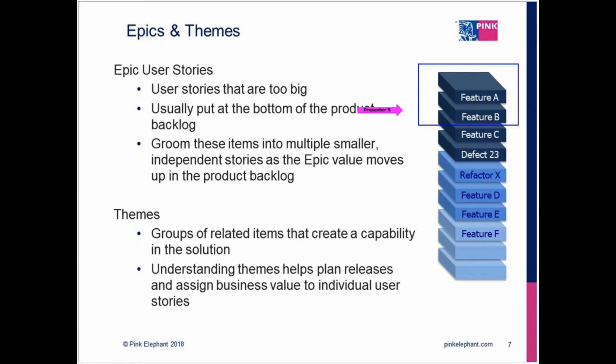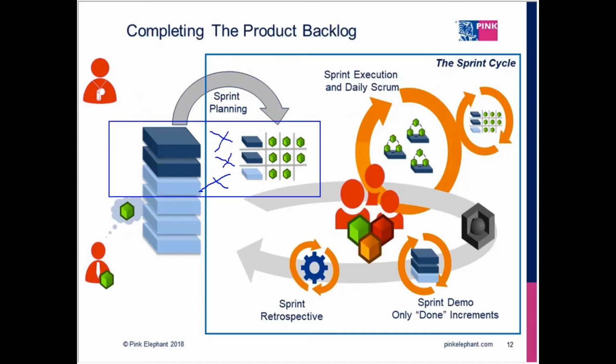And down here, when we bring it into the sprint, that's where we can break it down to a set of related tasks. And this is where a user story that might be big because of dependency can be split over multiple sprints, because we can still break it down to the independent pieces, but the story is not complete until we get the second one done. So that's how we could manage it with still fitting it in a sprint and getting part of it done, but knowing that it's still related.